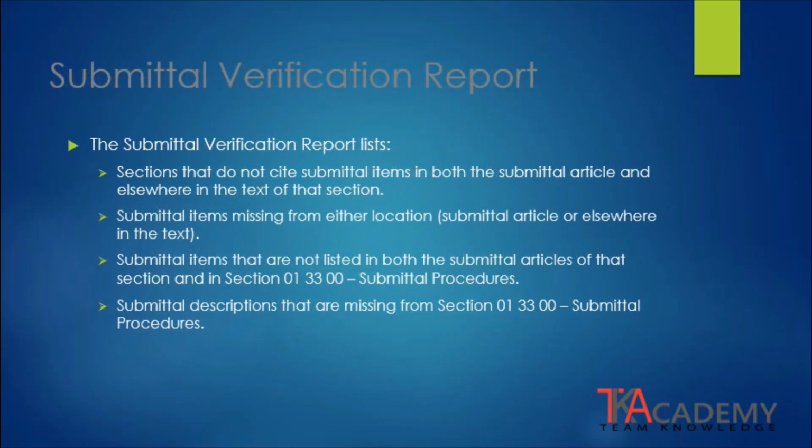Submittal verification is very important for what submittals are going to be required on your project. The submittal verification report lists sections that do not cite submittal items in both the submittal article and elsewhere in the text of that section. Submittal items missing from either location, the submittal article or elsewhere in the text, identify submittal items that are not listed in both the articles of that section and in section 013300 submittal procedures. It also identifies submittal discrepancies that are missing from section 013300 submittal procedures.